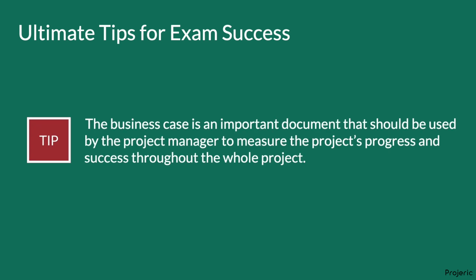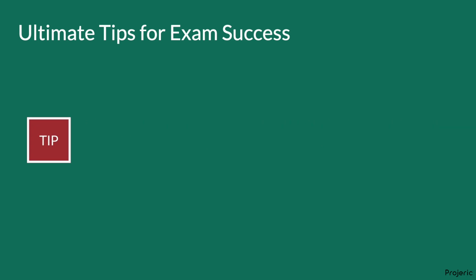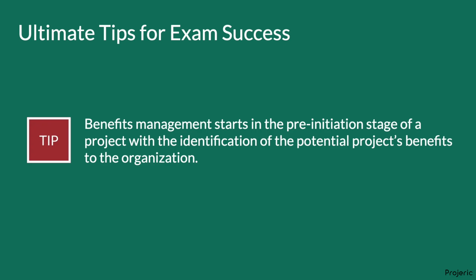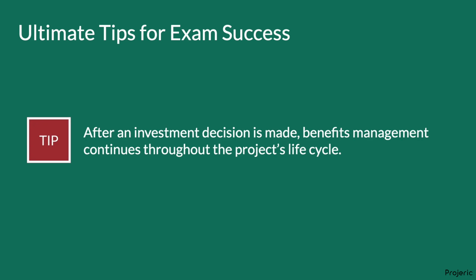The business case is an important document that should be used by the project manager to measure the project's progress and success throughout the whole project. The needs assessment is often conducted before the business case and is used as input for the development of the business case. Benefits management starts in the pre-initiation stage of a project with the identification of the potential project's benefits to the organization. After an investment decision is made, benefits management continues throughout the project's lifecycle.